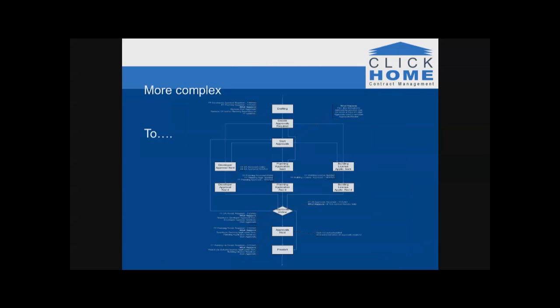And here is a combination of all of those. So we've got the notion of an approvals workflow. We're coming in, we've done drafting, and we go into a task called decide approvals required. In here you'd be asking several questions: do we need developer approval? Do we need a planning application? Do we need a building license application? Based upon those answers, we would decide whether we need these tasks, or these tasks.